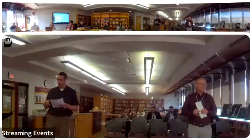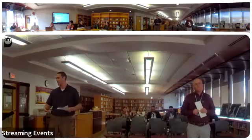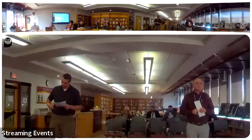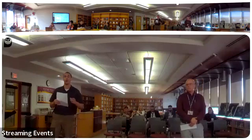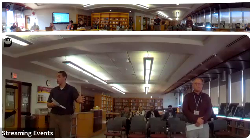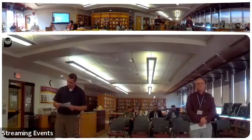So we did get a large delivery. The TRA subfloor material, obviously that's how they've been progressing that work up there. UPK windows, which you see were installed, that was the first week of April. And then the UPK exterior brick is going to be towards the end of April. It's going to line up really nice because the masons should finish with the pool east wall, and then we'll be able to transition over to UPK, so we won't lose that, which is really nice.